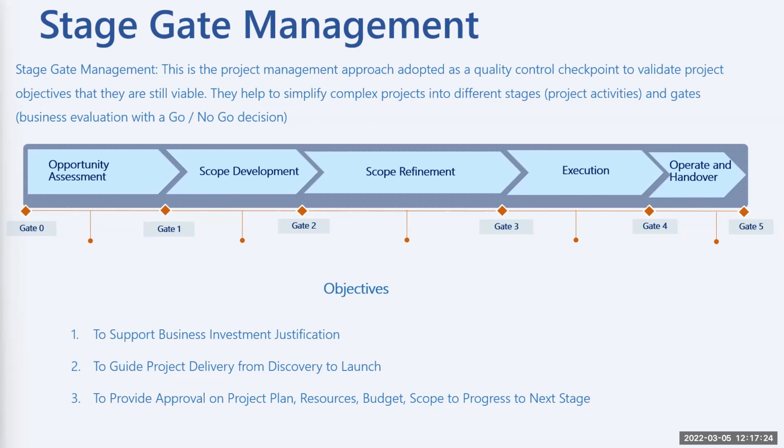And the governance framework, we talked a bit about governance last week as well. Governance is a framework saying, okay, for this type of project, these are the key deliverables that need to be delivered. We'll still talk about this in terms of what you need to know. So in the governance framework, it will talk about what the different deliverables are for each of the phases of the project. It is always highlighted there.